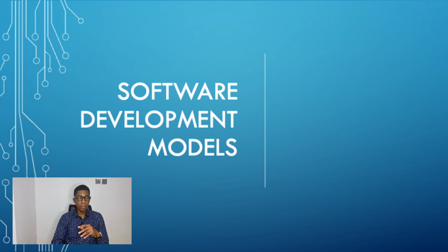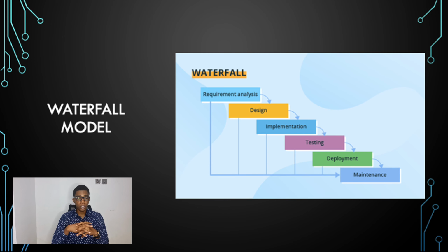So starting with the waterfall model. Throughout all the development stages, analysis, design, coding, testing and deployment, the process moves in a cascaded mode. Cascaded mode means each stage has concrete deliverables that must be strictly documented, and these deliverables must come one after the other. The next stage cannot start before the previous one is fully completed. So it goes in a waterfall, or cascades down.